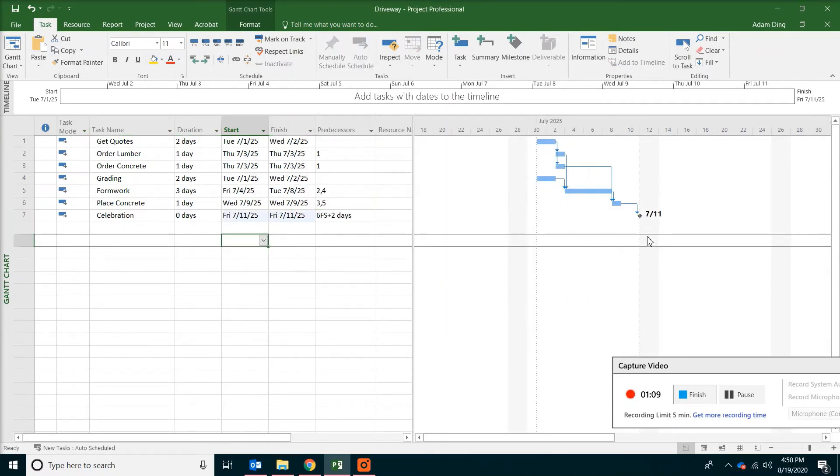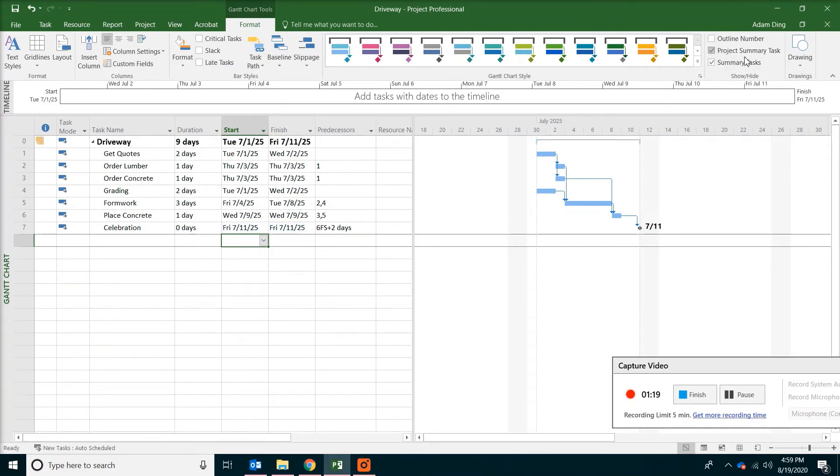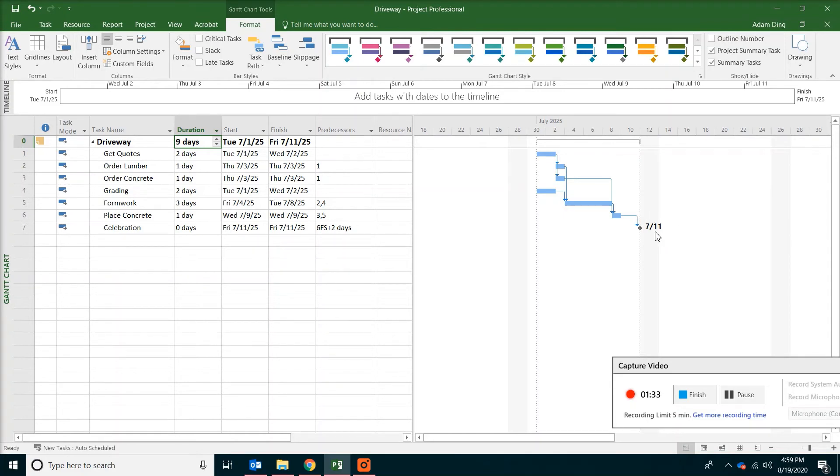And it seems like the milestone is July 11. Now go to format on the top. And then check project summary task. This is a convenient way to show the project duration. That indicates the project has nine working days. Nine working days plus two days for the weekend. And then you do have eleven calendar days.